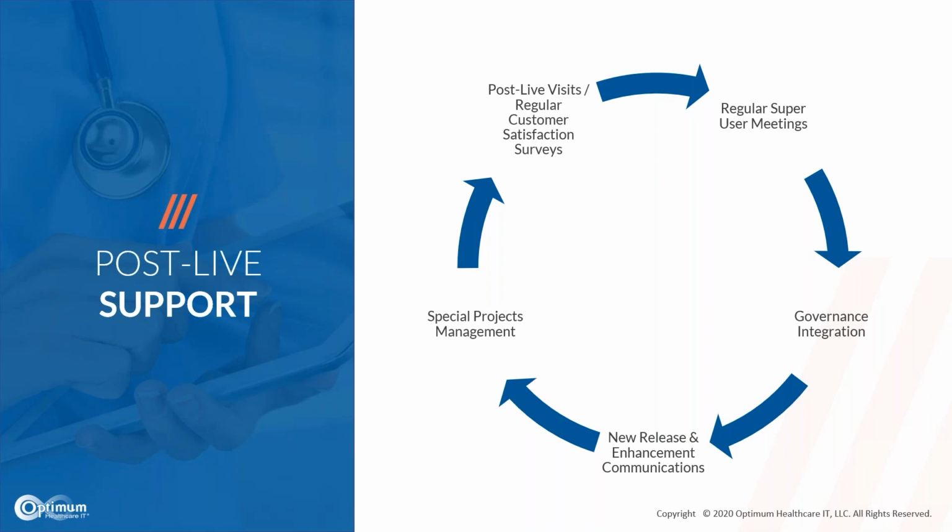So when you're talking post-live support, immediately post-live, your first focus is, of course, on stabilization. But once those immediate issues die down and it's less about high priority break fix, it's important to spend some time with your clients on post-live visits, really understanding ongoing concerns or pain points, and then make those deep dive visits an ongoing annual, maybe semi-annual thing that you do with them to make sure that you're hearing some of the things that you might not hear or might not be able to see from break fix tickets and from